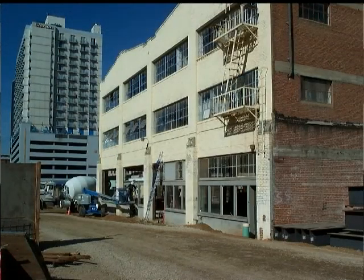The building had to be prepared for the move. The inside area of the first floor was demolished to make room for the support structure to be built. Non-structural exterior walls had to be removed and the bricks sorted by wall and stored for use during the renovation. The interior floor had to be leveled, some asbestos removed, and precise measurements had to be taken to record the elevation of the building at multiple locations.